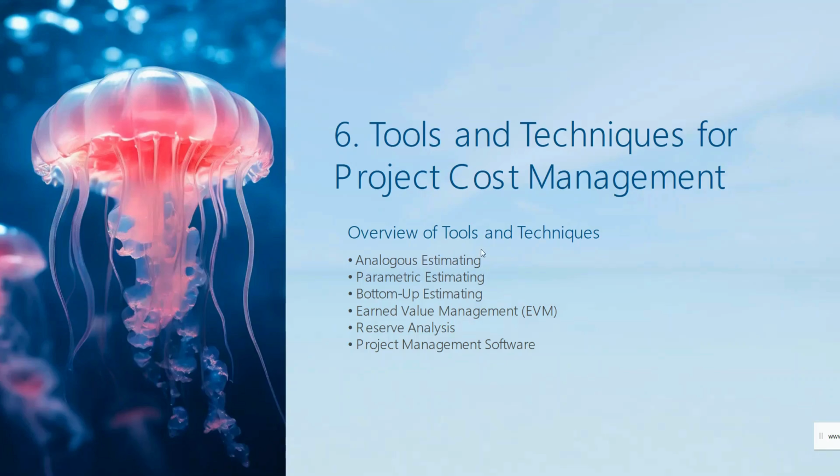Second, we have the parametric estimating technique. It is a statistical method that uses historical data and mathematical models to estimate the cost based on a variable such as size or duration. After that we have bottom-up estimating.